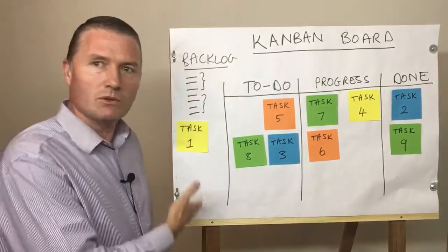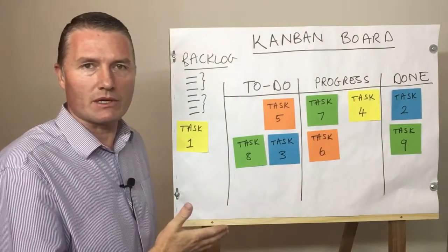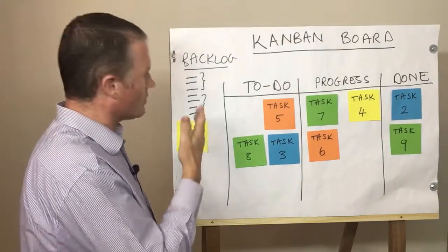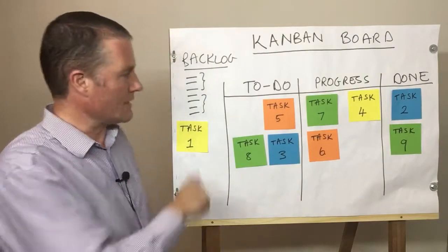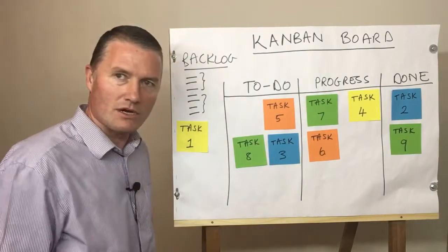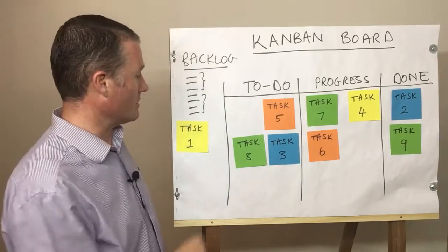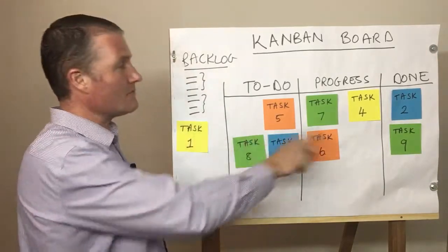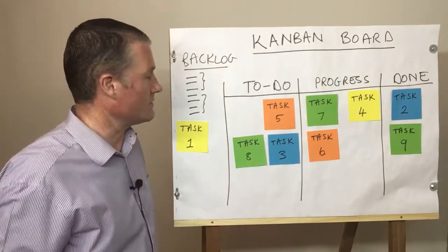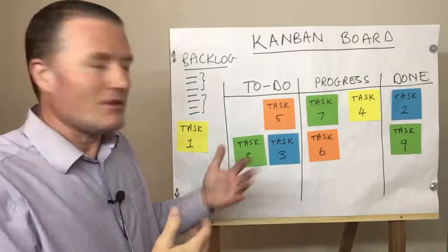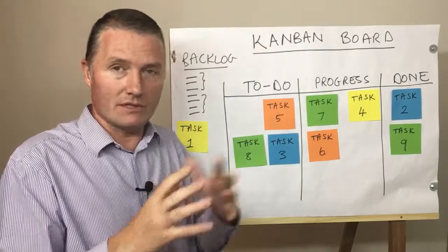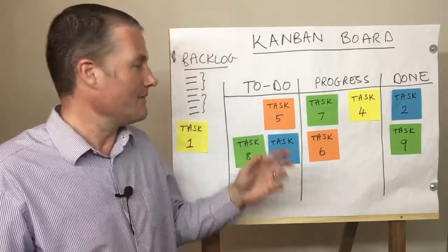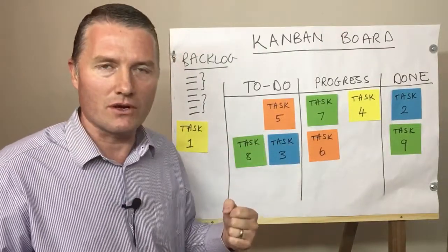And that's a visual reminder to everybody that it's a good idea to limit the number of tasks that you focus on in the backlog. Because as you saw now, even though we put the tasks in there that we thought we could make progress on, this one just stubbornly refused to move into the progress column. And if you have tasks here that don't move, and again, whether it's in a team meeting or for yourself, then take them out of the to-do column.